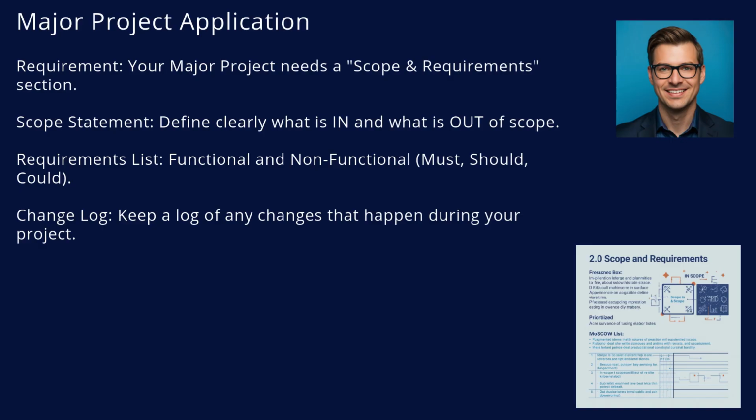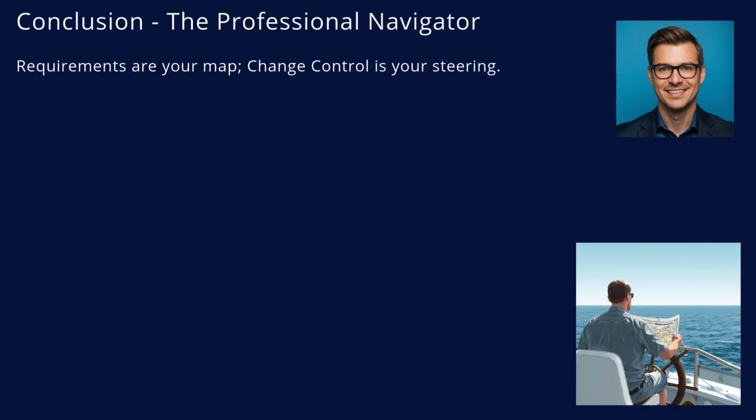If you change your approach halfway through because of a technical issue, document it. Change request 001, switch database provider due to latency issues. This proves to the assessor that you actively manage the project's evolution. To conclude, think of requirements as your map and change control as your steering wheel. Do not fear change. It is a sign that the client is engaging and the business is evolving. But you must manage it.